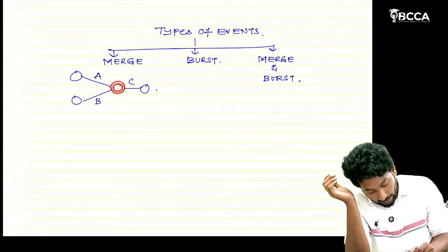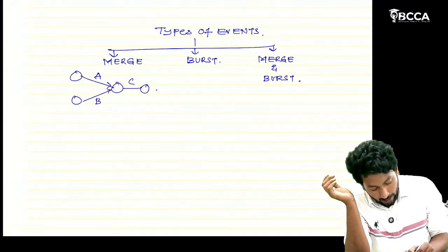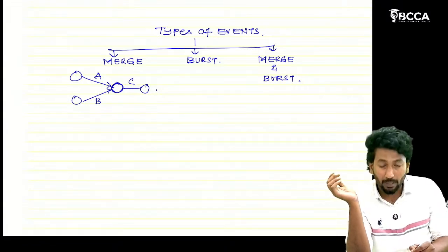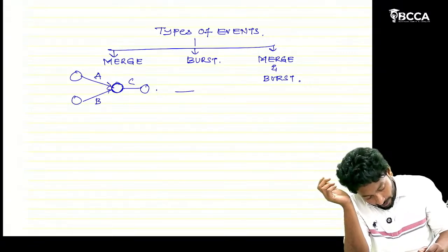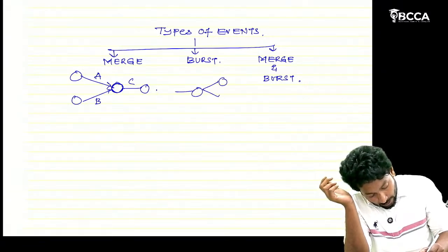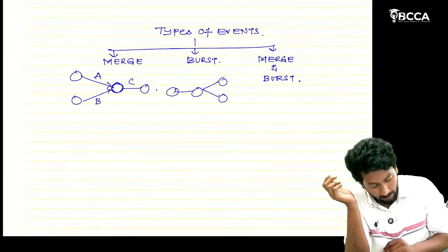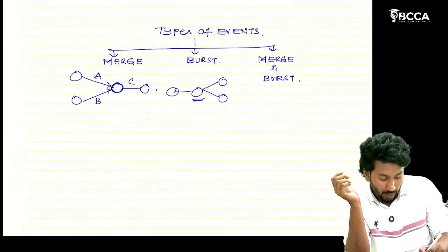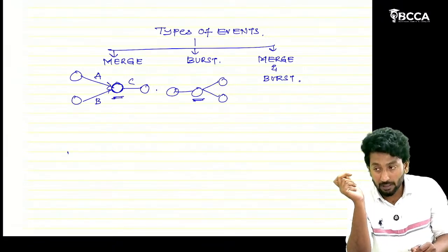The event at which two activities are meeting is called a merge event. The event at which two activities are splitting is called a burst event.